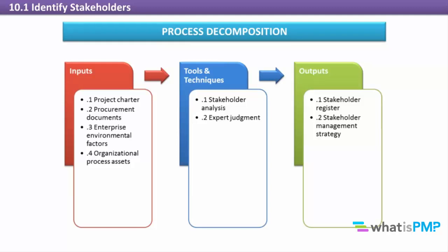As we look for stakeholders, we need to keep in mind that not everyone will perceive our project as being beneficial. Whether their opposition comes from real or imaginary factors, we cannot ignore these negative stakeholders. We need to identify them, discover the root cause of their opposition, and develop strategies for addressing their issues or mitigating the risks their opposition can create.